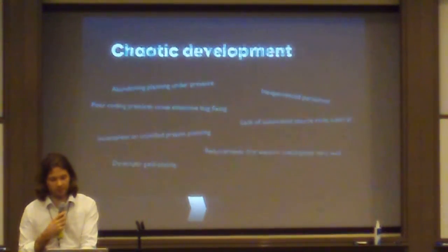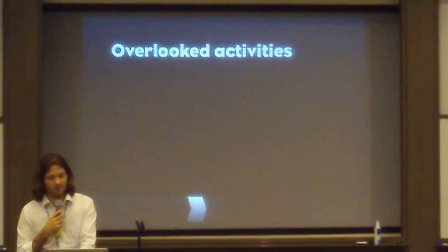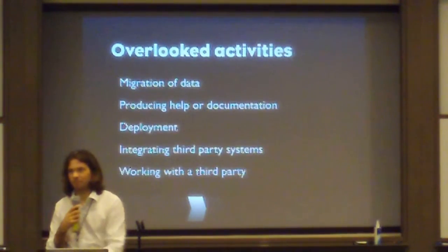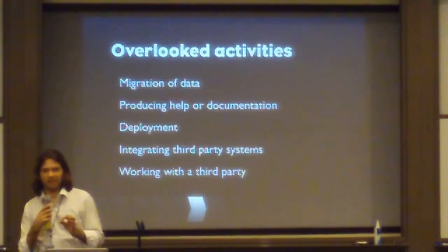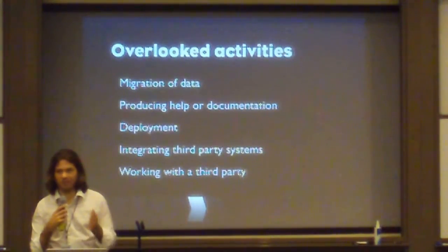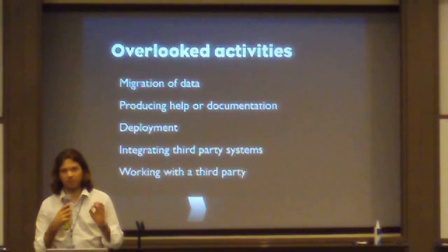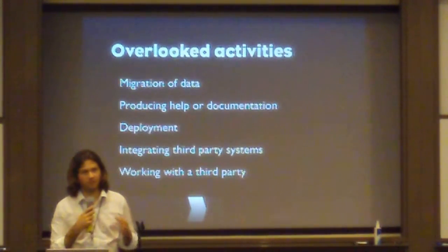Then there are also the overlooked activities. These will also add to your estimate. They include migration of data, migrating data from another site, or importing data. These things take a lot of time. You should never do them in fixed. We never do them in fixed. We always basically do them on running account.